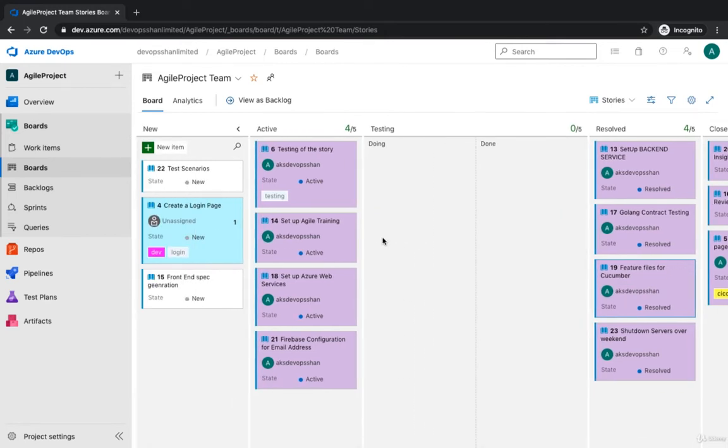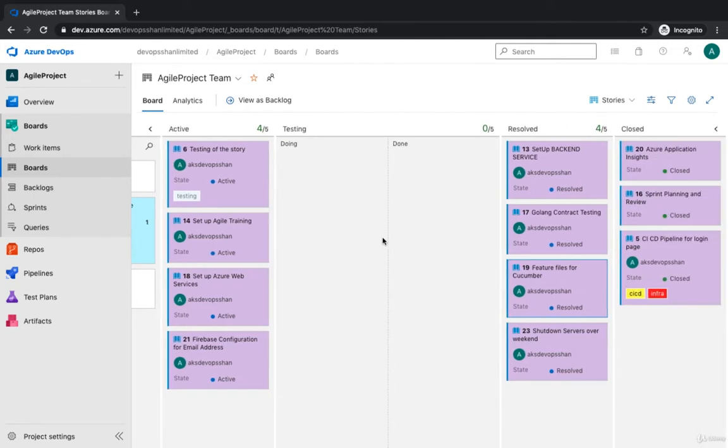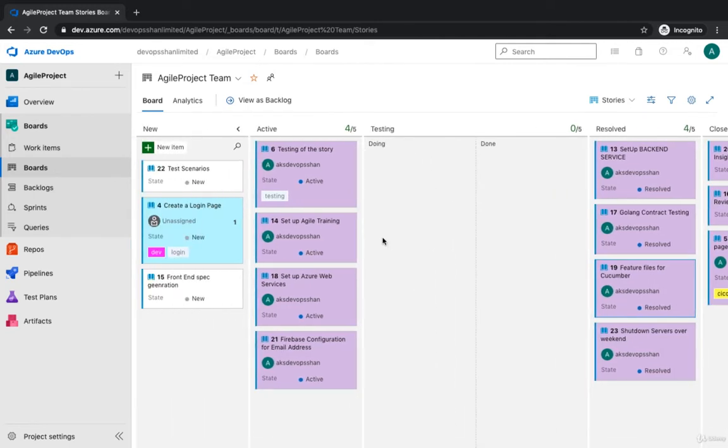Another thing is called swim lanes in Azure DevOps. Your board, your Kanban, supports the ability to visualize all of your stories and all of the tasks you are moving across different lanes. When you use swim lanes, you can visualize the status of your work that supports different service level classes. You can create swim lanes to represent the dimension that supports your work needs, and you could have different swim lanes, just like swimming pools, across these lanes.